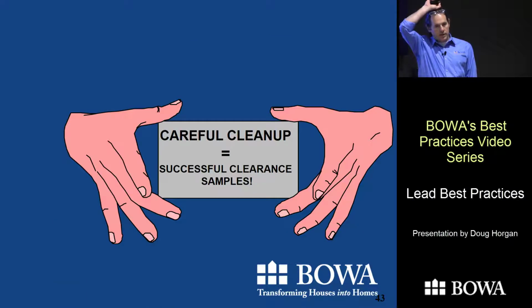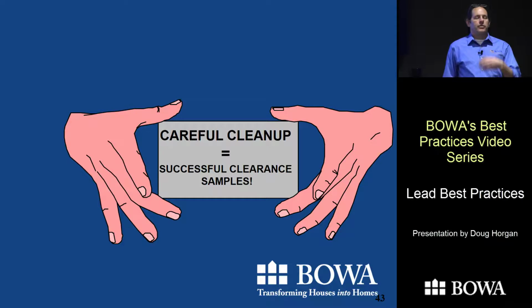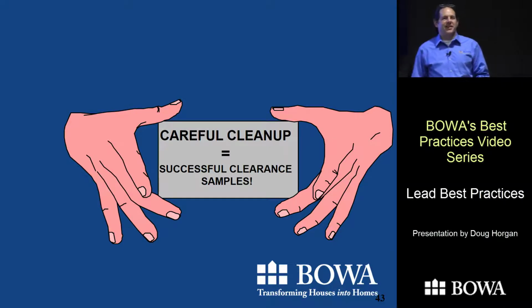Hey, Doug, how long is the turnaround time for that third-party test so you know if you're clean or not? The question is how long does it take to get the test results back. A rush test is 24 hours, and that's about $60 for each work area. A normal test is 2 to 3 days, and that's about 30. And from what I've heard, a lot of times the normal tests come back in 24 hours. They just don't promise. So it depends on how much of a hurry you're in.